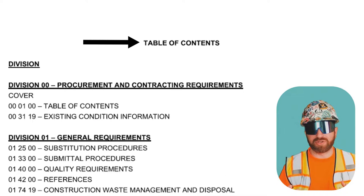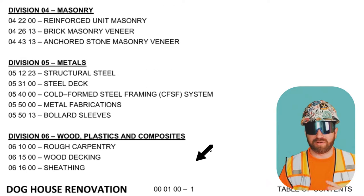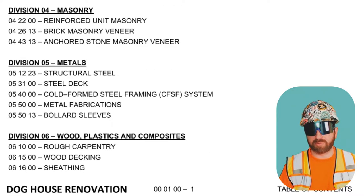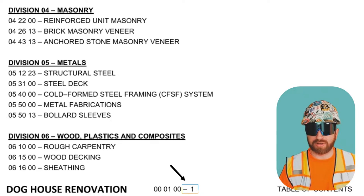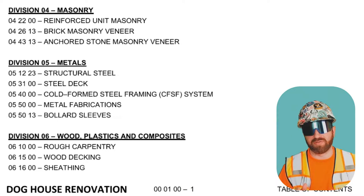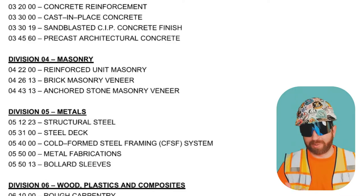There will typically be a title at the top of the page to indicate which division you are in, and the division number is usually also at the bottom of the page. Following the division number at the bottom of the page, you'll usually find a dash one, dash two, etc., to indicate which page you're on within the specification division to further help you navigate.